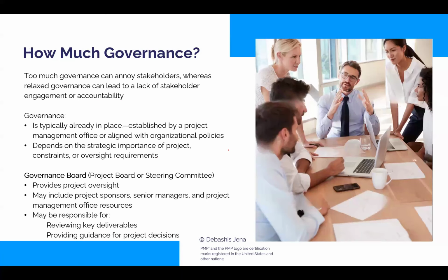But before that, who would define governance? There'll be a governance board. In some projects, they have a governance board who is going to govern the project. It could be a single person, a sponsor. Elsewhere, it is a committee or a board with some people who would provide all direction or governance to a project. PMO would establish the governance framework if there is a project management office in an organization. So your governance for the project has to be aligned with that.